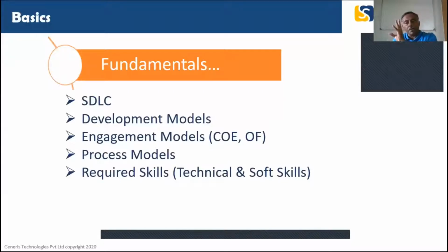The efficiency of the team here is more or less controlled by the provider, that is the requirement provider. The vendor companies, which are providing services, have to ensure the resources are present all day, they are doing the deliverables as required, and we have a benchmark. For example, in testing, the person can write around 30 simple test cases, or 12 or 13 medium-level test cases, or around 25 to 30 simple-level test cases. That's called the productivity of the person. So the service providers should ensure the productivity and the availability of the person, and more or less the soft factors like communication and meeting attendance, and many other things. That is one model.